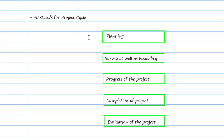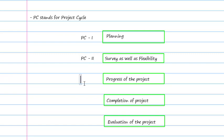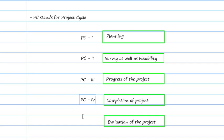These phases map directly to the project cycle numbers. The planning phase is known as PC1 — Project Cycle One. The surveying and feasibility phase is known as PC2. Progress of the project during construction from start to end is PC3. When your project completes, you prepare PC4 — the completion phase. And the last phase, PC5, is the evaluation of the project.